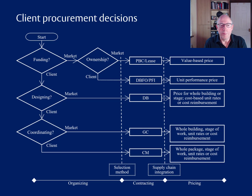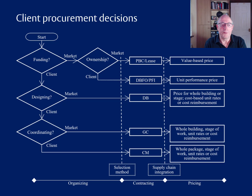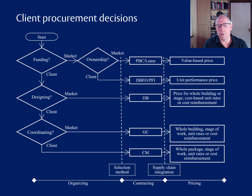If the client wants to fund the process from their own money, they have to ask: are we going to go to the market for the design? If the answer is yes, we'd be falling into a design-build project. If the answer is no — we want to take control of the design process as a client — then we ask what about coordination. If we want the market to take care of coordination, we'll be going into general contracting. If we want to coordinate it with our own person, we'd be going into construction management.